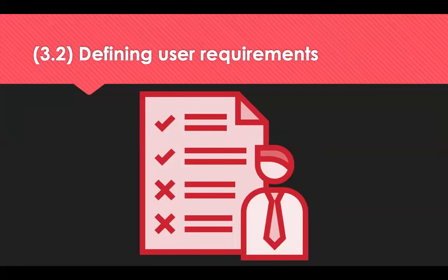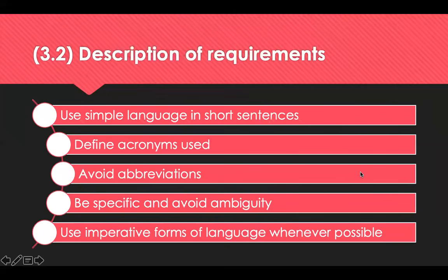CIPS state that the first and most critical step in producing a through-life specification is to define the user requirement, and that many problems in delivery and through-life management stem from an unclear requirements definition. So here we can help by ensuring that a common understanding prevents misunderstanding, which can in turn result in time and effort being wasted, or worse, defective products that can cost lives.